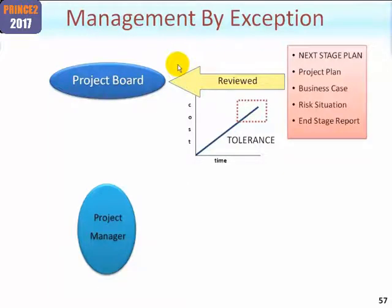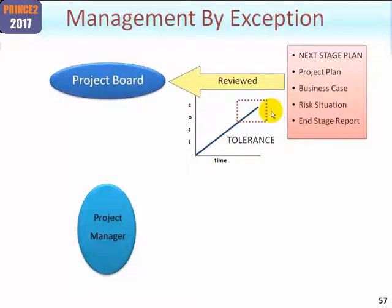At this juncture the project board, having reviewed the next stage plan and let's suppose they are happy with it, would set tolerance for the next stage. I've just shown an example of cost and time here, although it may be other metrics of tolerance. They'll also advise the project manager of how often they want highlight reports and what particular information should be included.